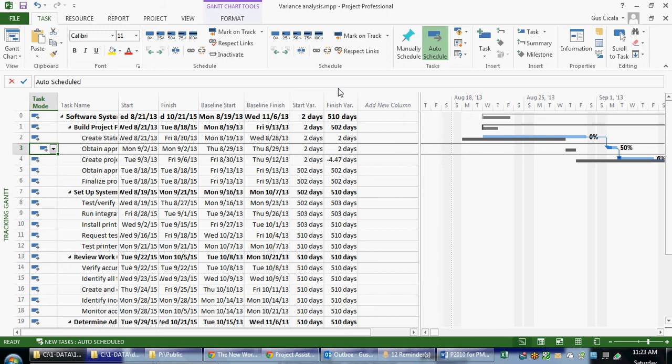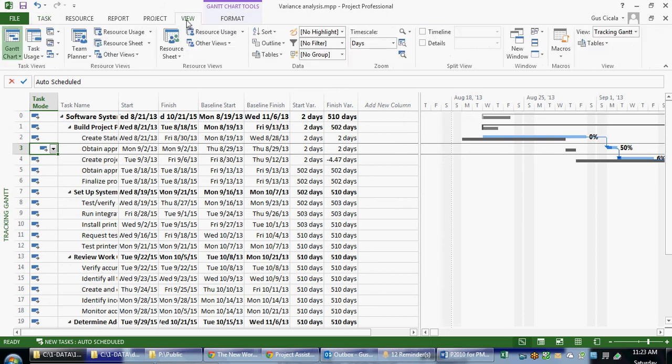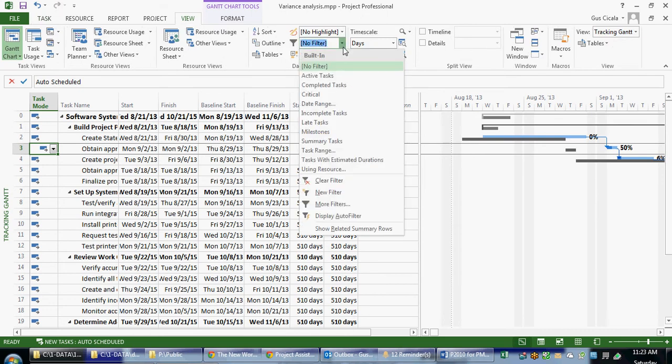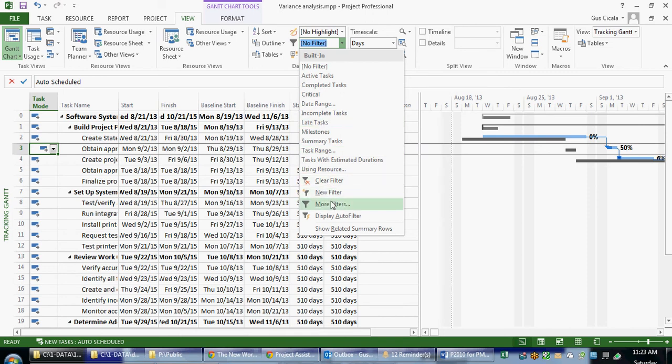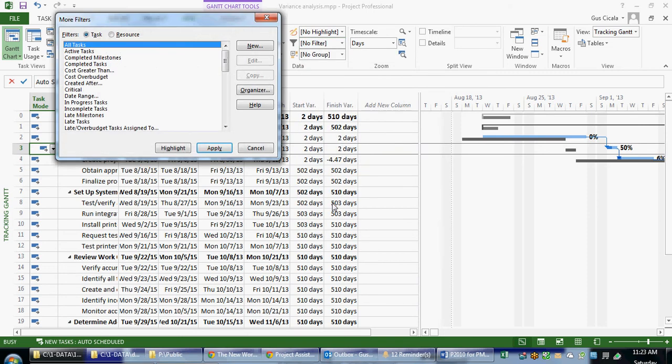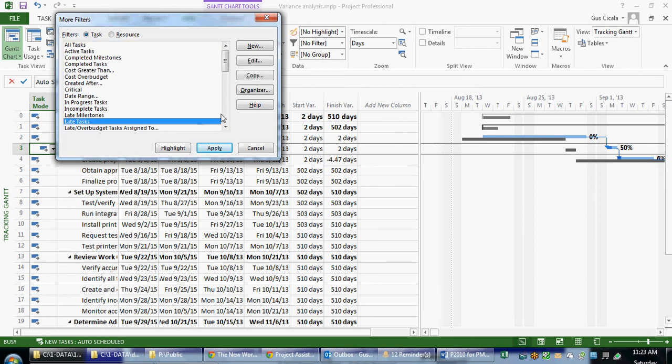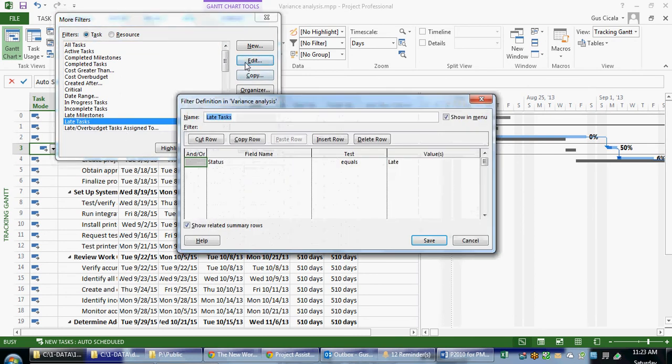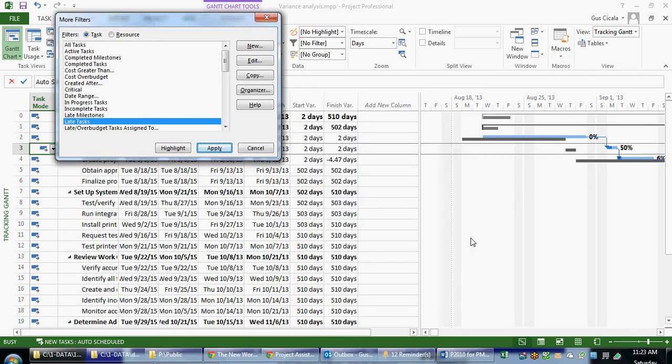We can also apply filters. So when I apply a filter from the View menu, I see a drop-down here and we can see different filters. For example, Late Tasks. If I choose Filter More Filters, I can edit the Late Tasks filter and get a sense of what the Late Tasks filter is going to look for. And there's actually a status field called Late.